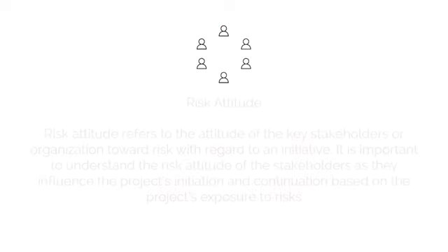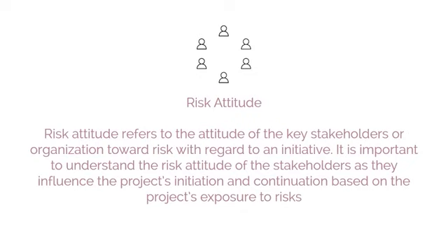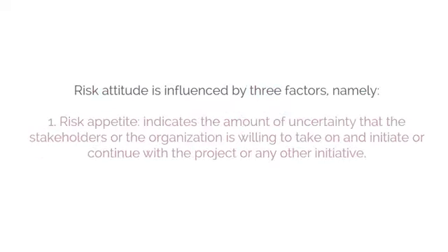Risk attitude. Risk attitude refers to the attitude of the key stakeholders or organization toward risk with regard to an initiative. It is important to understand the risk attitude of the stakeholders as they influence the project's initiation and continuation based on the project's exposure to risks. Risk attitude is influenced by 3 factors, namely, risk appetite, which indicates the amount of uncertainty that the stakeholders or the organization is willing to take on and initiate or continue with the project or any other initiative.